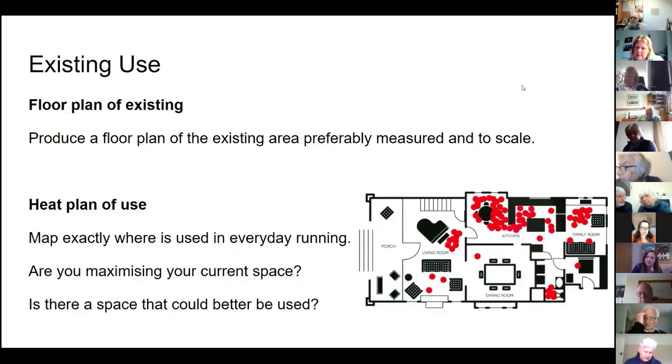Actually, if you do speak to English Heritage, or Scotland and Wales, no matter where you are, they are encouraging if you have a sensitive project that you want to carry out that will preserve the life of the building. They are actually quite amenable to trying to help you find a solution. It's just you get into a bit of a problem if you don't approach them first. Some people say it's easier to ask for forgiveness than permission, but it's not the case with listed buildings. They definitely like you to ask for permission first.